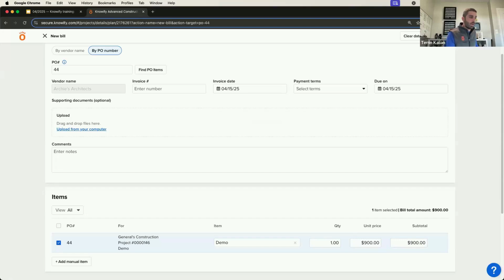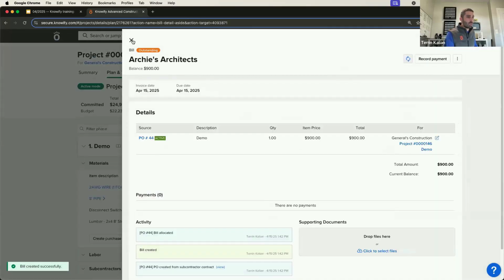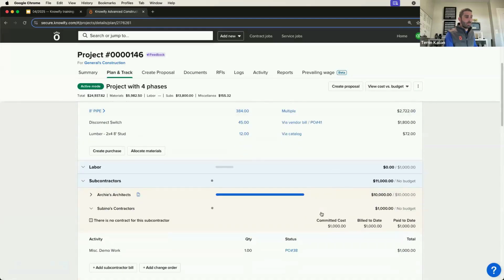project. So they send me a bill for 1,000. I might have said 100 earlier, but they send me a bill for 1,000. I log the bill for 900, so it still shows the outstanding amount. That way, when everything is said and done, everything's been fully billed. The outstanding amount of the contract that could be logged in the bill is the amount that is being held in retention. And so we have the ability to track that.